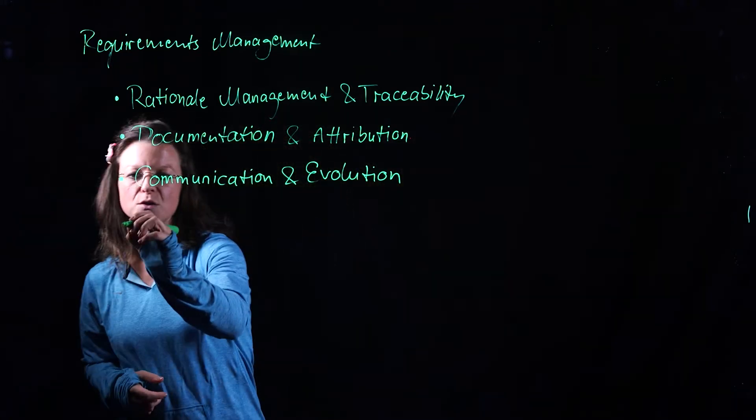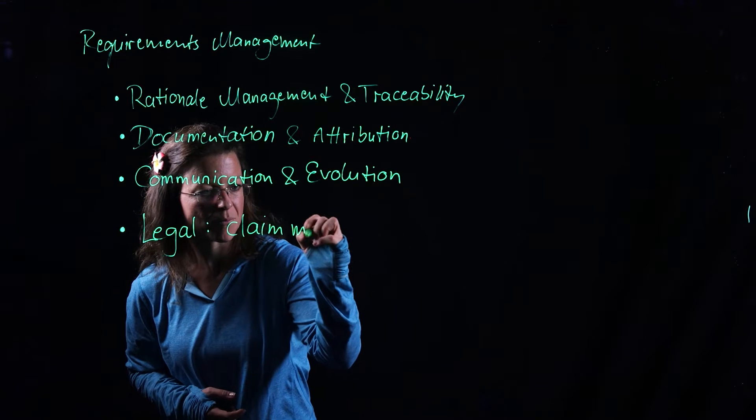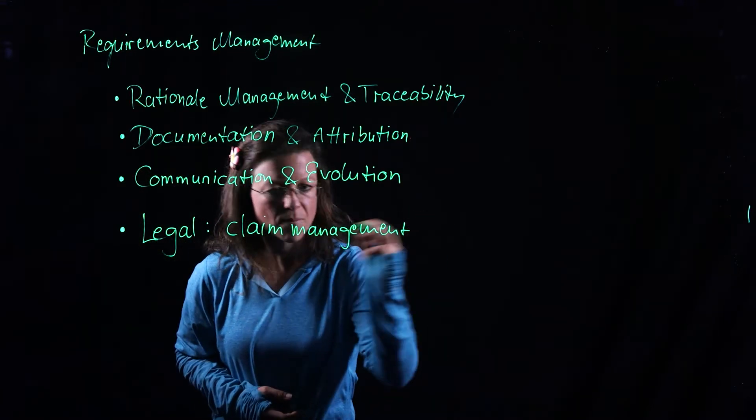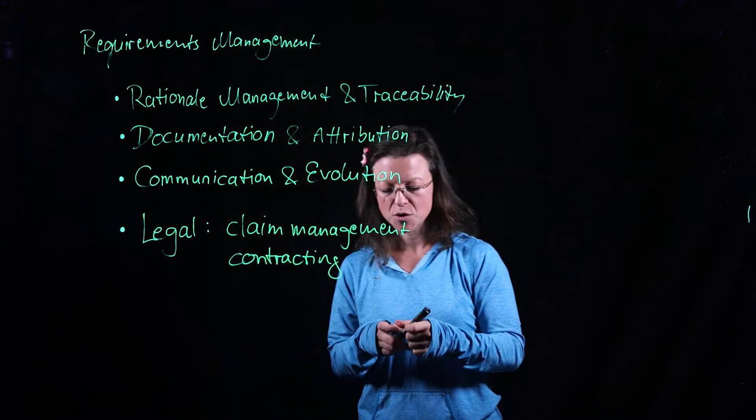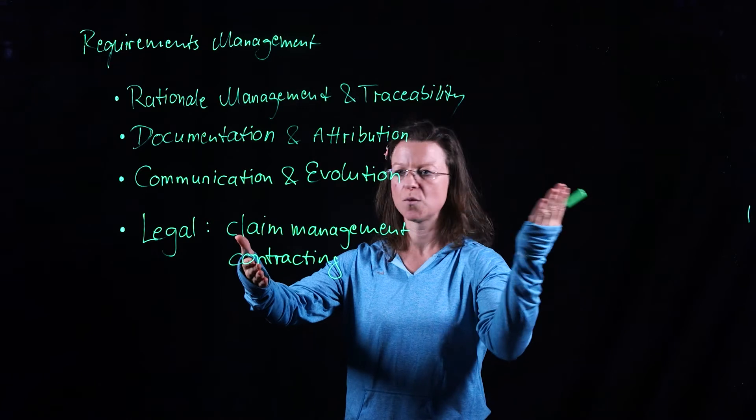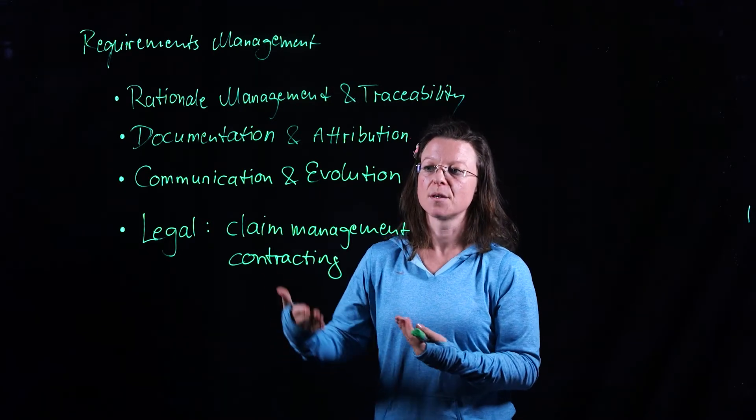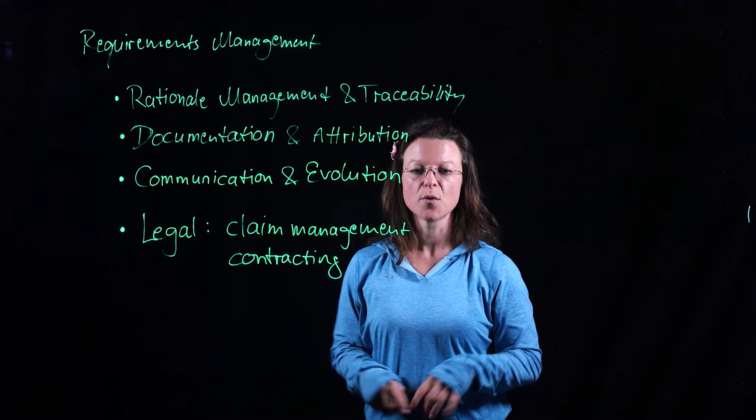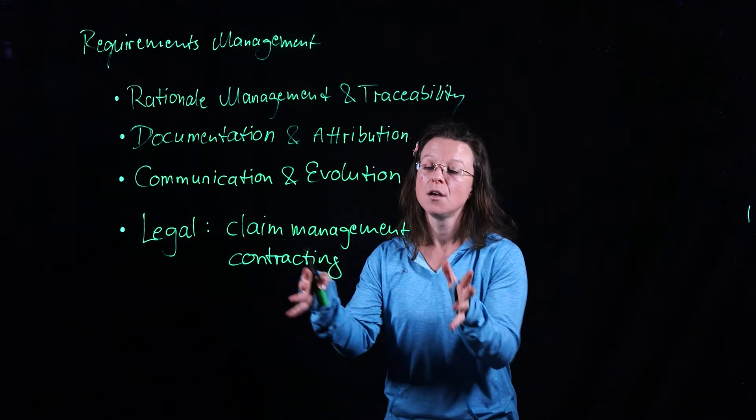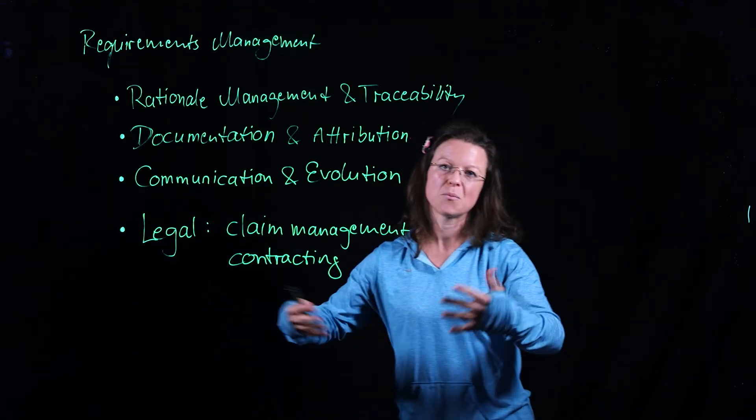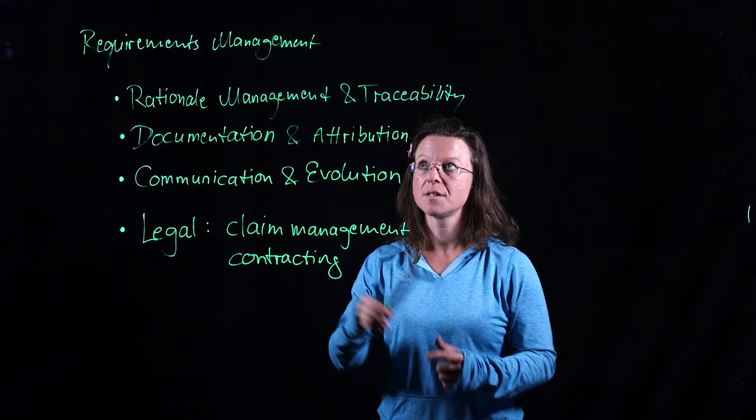We also have a couple of legal concerns: claim management and contracting. As a requirements manager, I'm also responsible when claims come in saying this should be in here, and for some reason it's not implemented or it's implemented differently from what the claimant thought it should be. Contracting is about what is our baseline for the requirements for which our client signed the contract, so we can make sure that they don't try to introduce late scope creep where they get more for their money than we initially promised them, and so we're not going to shortchange ourselves. Those are your most important tasks in requirements management.